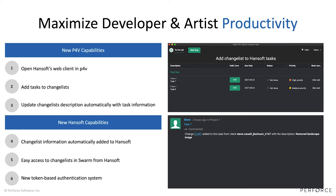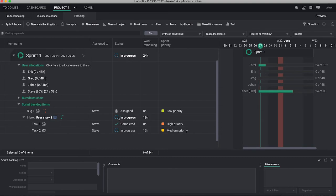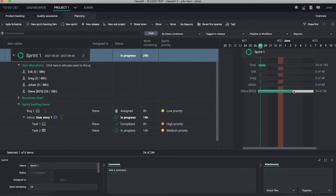If I go into Hansoft, this is a part of the planning view in Hansoft. We're looking at a sprint object, we've got a couple of people working together, and Steve here has been working on task 2. Steve still has quite a lot still allocated - more than half of the time available in this sprint - but the other people don't have much to do.